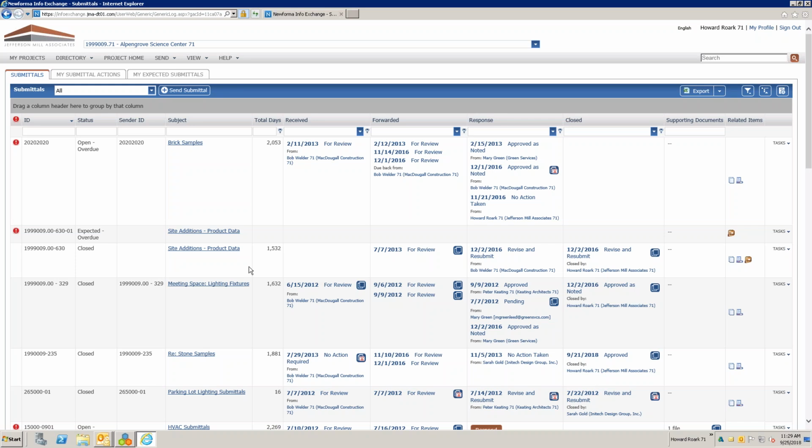When I log into InfoExchange, I will only see what I sent to Nadia and what she sent back when she closed it, because the forwarding to the reviewer and the recording of the review responses, I'm not named on as an external person, so I would not see those in InfoExchange.